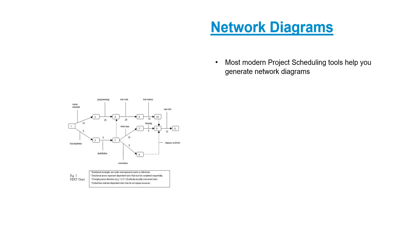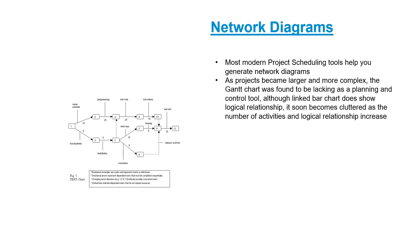Alright so as we have learned how to draw a network diagram, now let's review some of the basic theory. Firstly most modern project scheduling software tools would help you generate network diagrams. So if you are using a tool like Microsoft Project or Primavera or Astro Project, all you have to do is specify the tasks and their durations and the logical sequence and the software would automatically generate a network diagram.